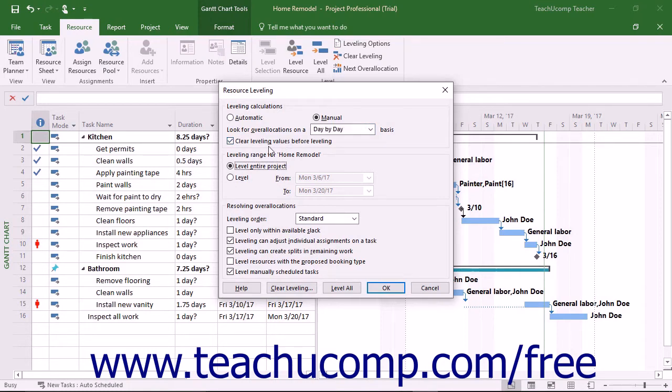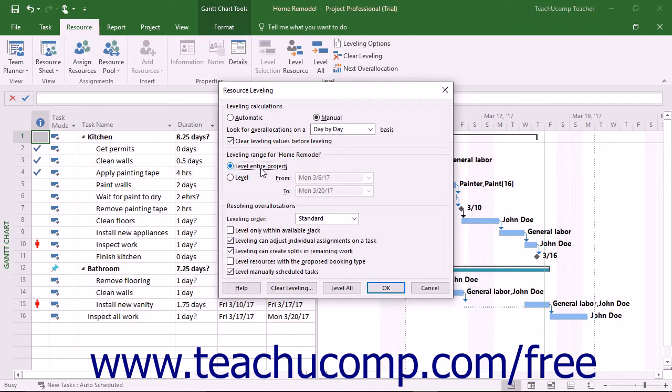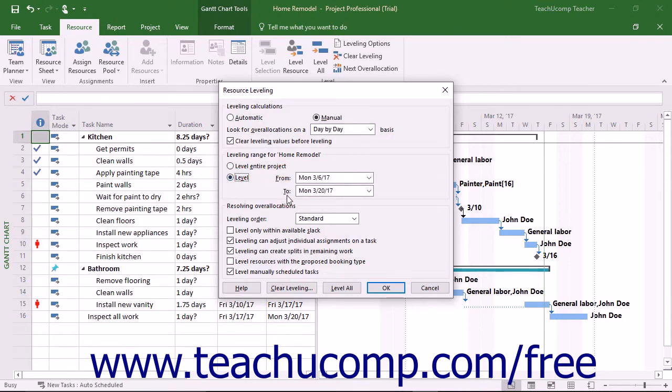Next, to level the whole project, leave the Level Entire Project option selected in the Leveling Range 4 section. Alternatively, to select the date range within the project file to inspect, select the Level option button and then use the From and To drop-downs to select the date range to level.